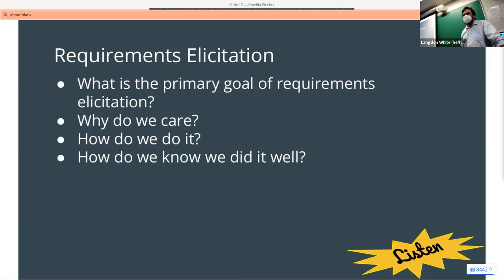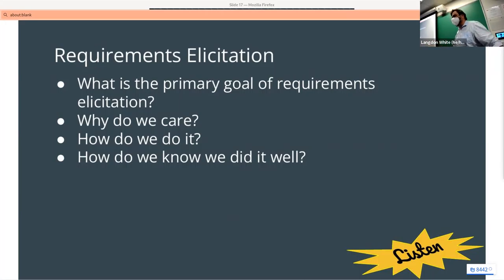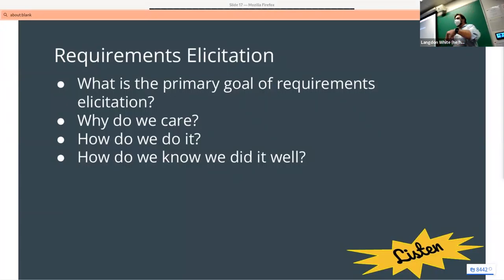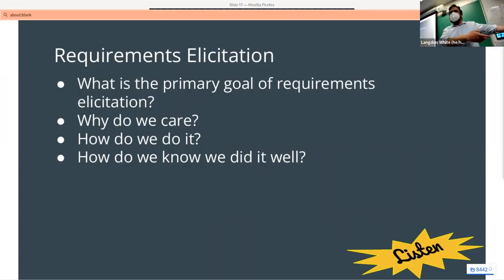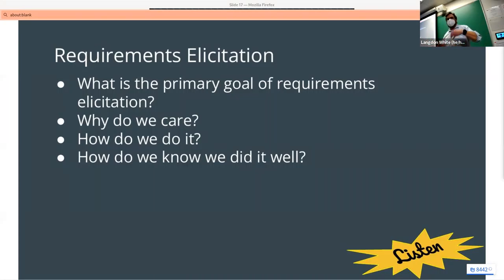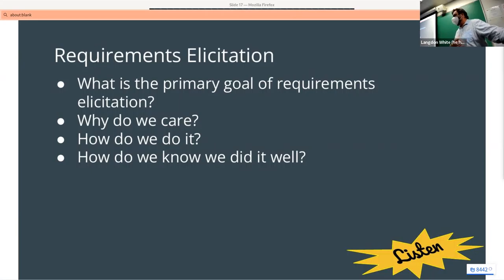How do you know you did it well? Usually you don't. This is why we put things in front of users as fast as humanly possible — only users can tell us if the software is meeting their needs. One sign you did a good job: after the client conversation you put everything into user stories and the product backlog, then give it back to them and say 'does this capture what we talked about, what's missing, is this clear enough?' You do the same with your team — tell them to look over what you gathered and give more feedback and perspective.